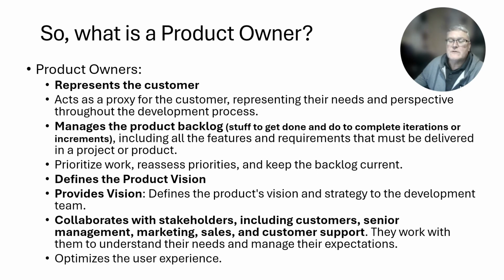I introduced the term product owner. So what is a product owner? Product owner, they represent the customer, the stakeholder that is going to have to deal with the outcome based upon the project. They act as a proxy for the customer. Generally, it's an internal person to your organization, but they represent the needs and perspective throughout the entire project development process. They manage the product backlog.